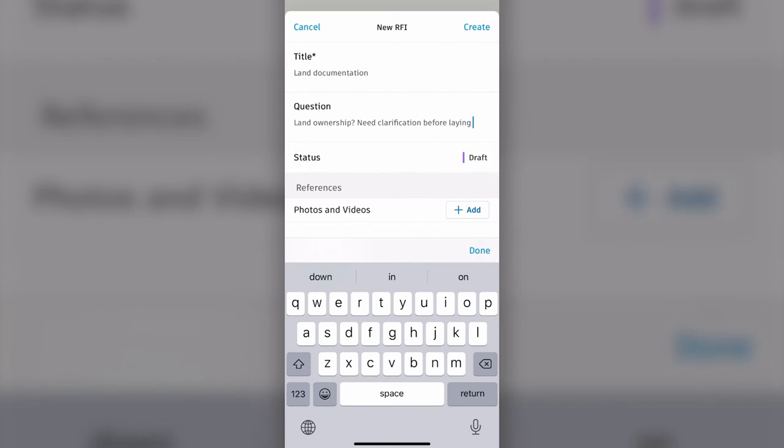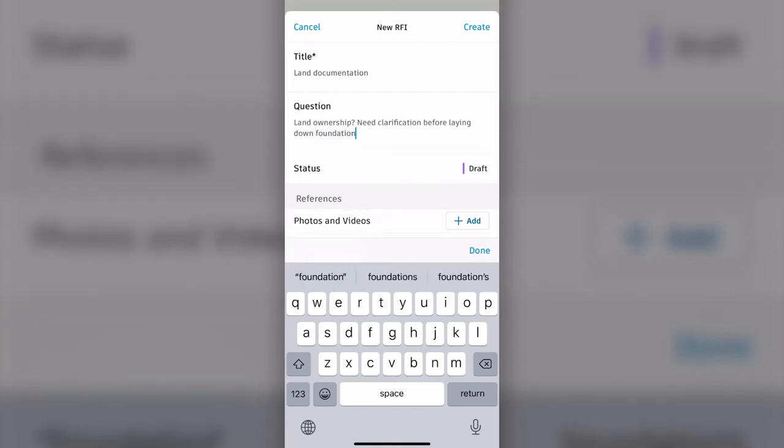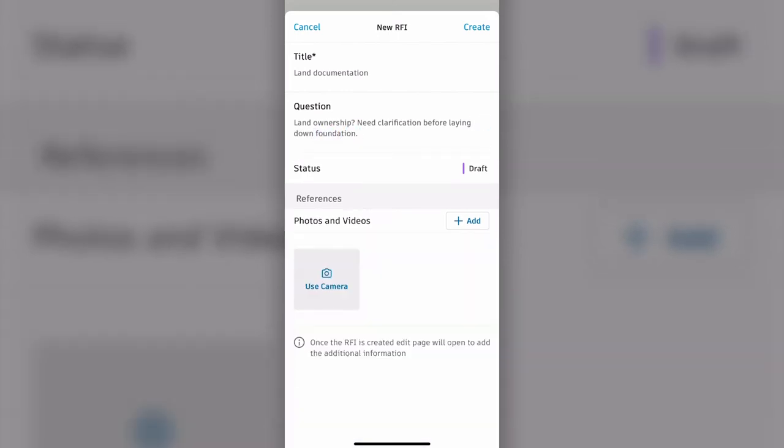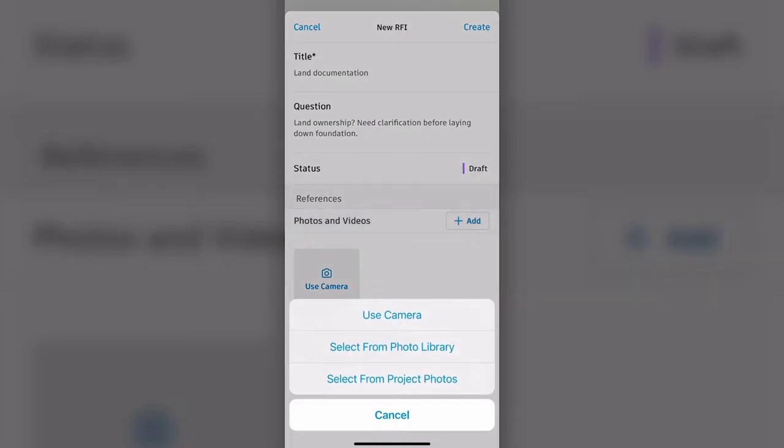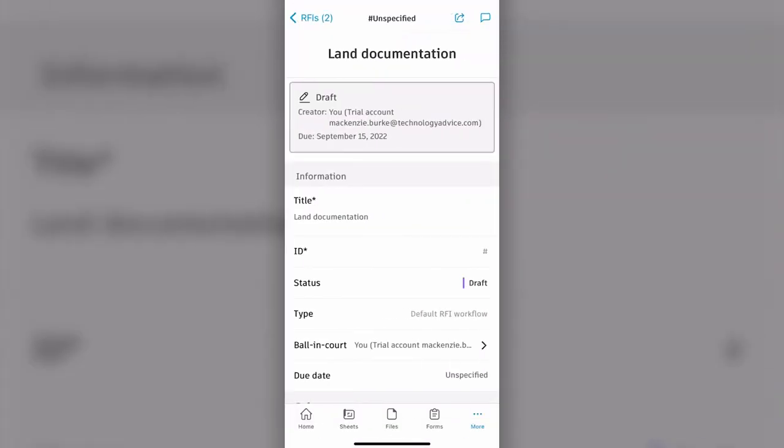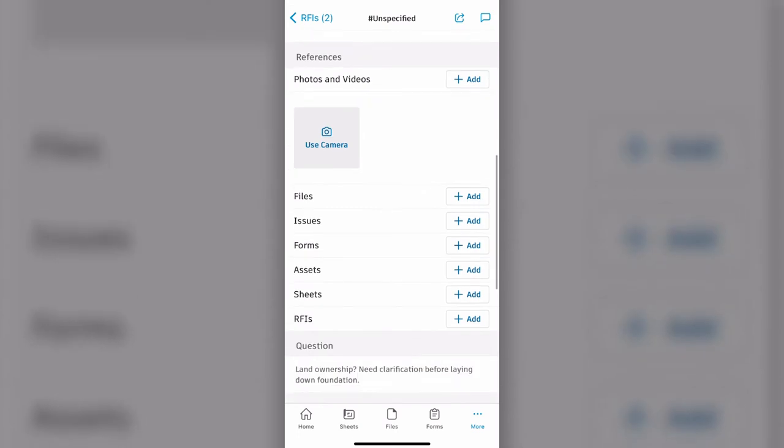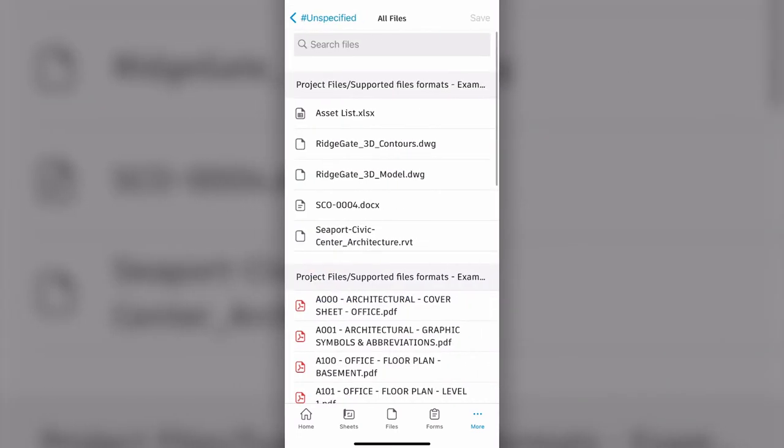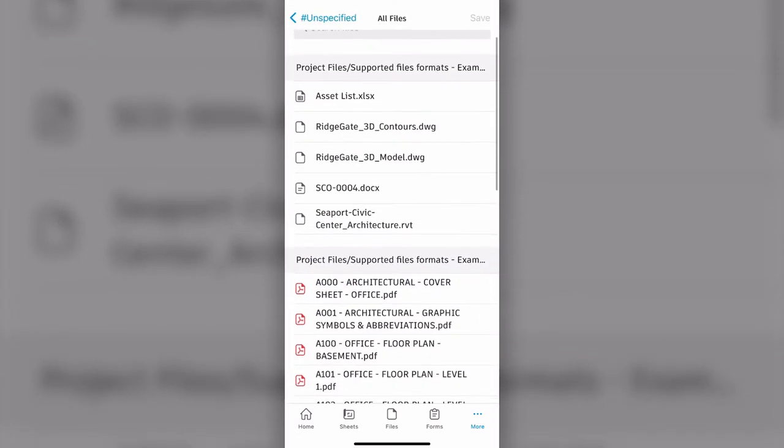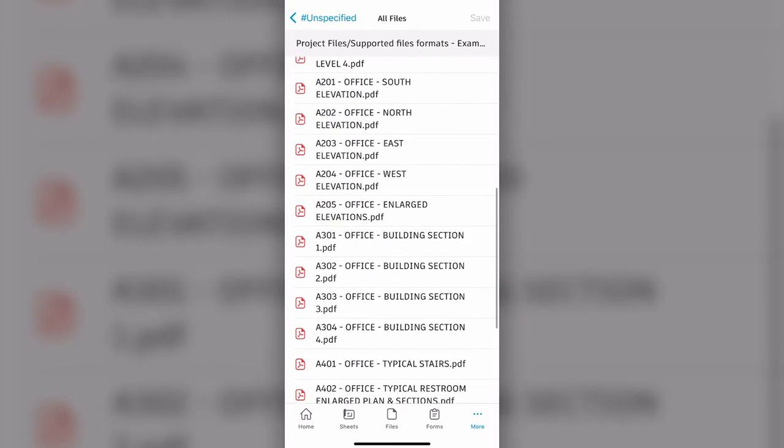There's also a feature called RFI Management. It stands for Request for Information, and it helps improve communication and create accountability. With PlanGrid Build, users can connect RFIs across the project lifecycle, link RFIs to tasks, escalate issues to RFIs, and link RFIs to potential change orders.